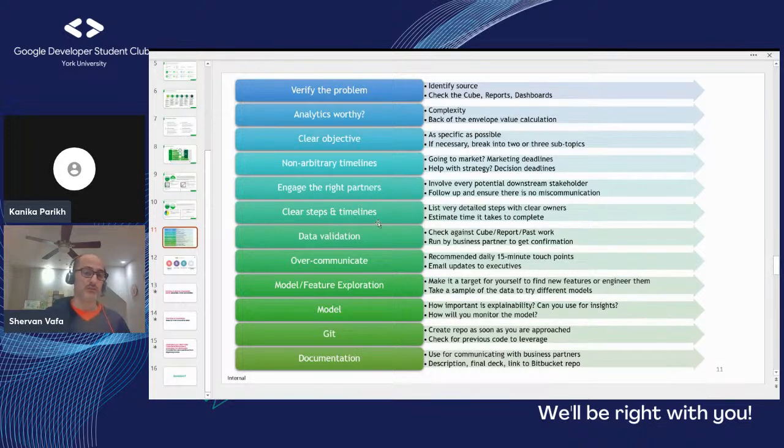Next, typically what we do at least is we create a work back schedule, right? From that date, all the partners, we sit down together. It's like, here are all the things that need to happen for this to go live. This is my responsibility. This is marketing. This is data. This is regulatory, etc. Right? But it needs to be all in one confined view. It creates transparency. It brings more trust to the process, and it helps everybody focus on what they need to achieve by when.